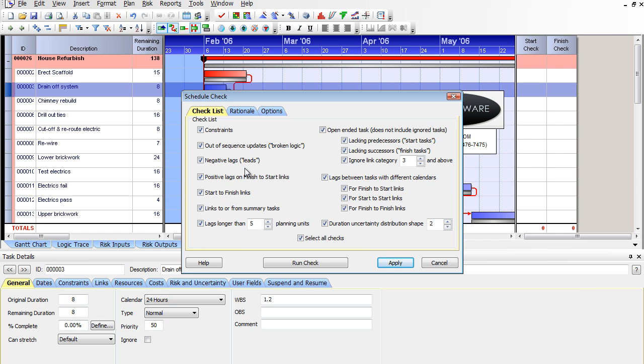It's a common misconception that if something shows up on this, you have to clean it. And I think sometimes between a risk analyst and a scheduler and a PM, there's confusion about this, and it leads to some headbutting. This is saying it's flagging it because it's a possible issue. Constraints should be used in your schedule, and they should be used correctly. But we try and use soft constraint types like finish on or after to hold float instead of the hard constraints like the must dates.